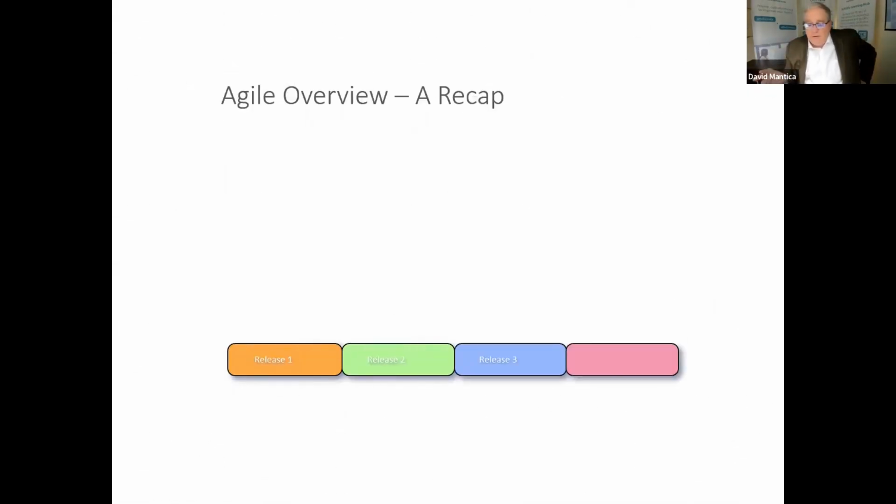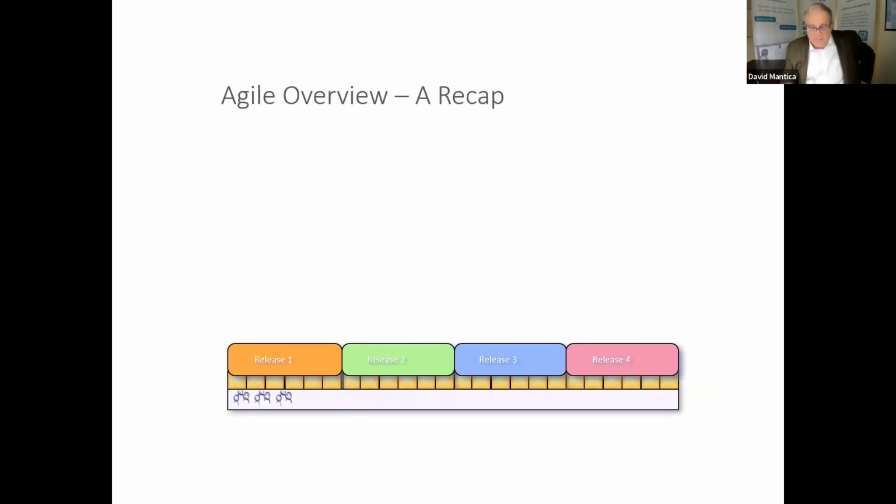So basically this is going to start rolling in an animation, showing you the different levels. That very bottom box with happy people, that's your daily stand-up. Each day you come together and say, this is what I worked on yesterday, this is what I'm going to work on today, and here are my impediments, my challenges. Can anybody help me with this? I think we need to bring these resources in, tight, concise, and to the point each day.